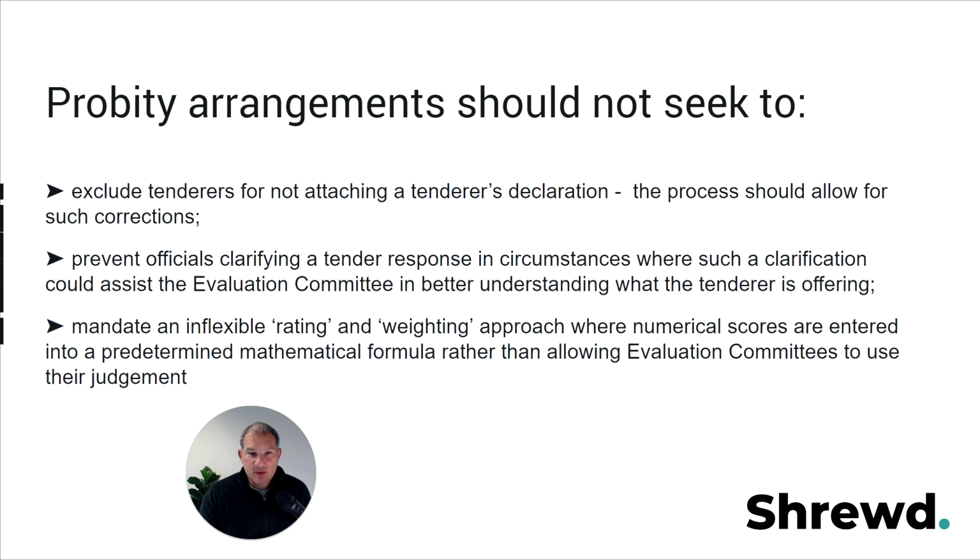And also, you don't want to put in place probity arrangements that mandate, as in compel you to undertake, a certain way of rating or scoring responses using some predetermined mathematical formula, because that could give you an outcome that doesn't lead to what you want. Now, obviously, you need to act consistently and fairly when evaluating and scoring all tenderers, but this is more about when you set up the probity arrangements, make sure you're not backing yourself into a corner by forcing yourselves to use a formula that will potentially skew the result. So that is something else to think about.